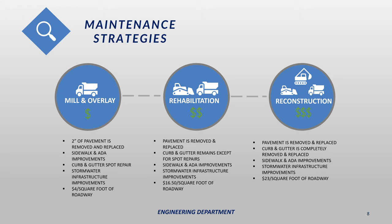The next type of project is a rehab, where we replace the entire pavement section but leave the curb and gutter largely in place. We do spot repairs on the curb and gutter and make ADA updates and storm sewer improvements as well. This project is more involved than a mill and overlay and costs about $17 per square foot of roadway. A reconstruction is where we completely remove and replace the pavement and the curb and gutter. This is the most complex type of project we do, typically costing about $23 a square foot — about six times what a mill and overlay costs.